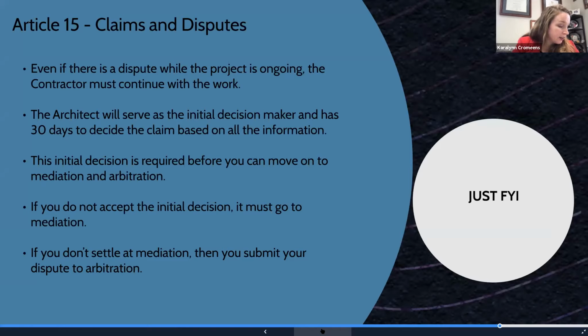I think in the current situation, arbitration is actually preferred, just because you can get a dispute decided way faster than you could in a courtroom. Right now, with COVID and everything that's going on, jury trials are way backed up, and so are regular trials for that matter. So in arbitration, you can get to a decisive hearing within, depending on the amount of dispute, 90, 120 days.